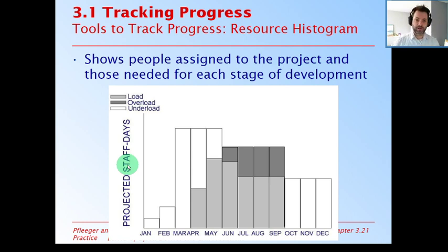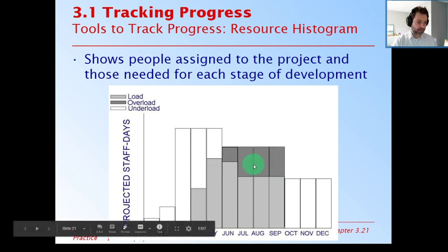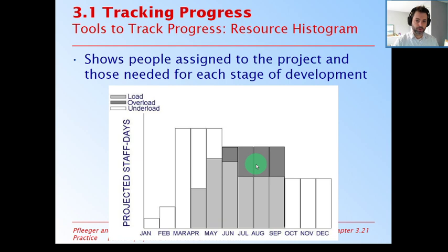You referenced various games where crunch time and poor management basically resulted in a bad launch day project, right? Well, if you look at a resource chart like this, you can very easily see if we are getting into overloaded status, crunch time, we're probably going to have problems. It's pretty obvious if you look at it that way, right?